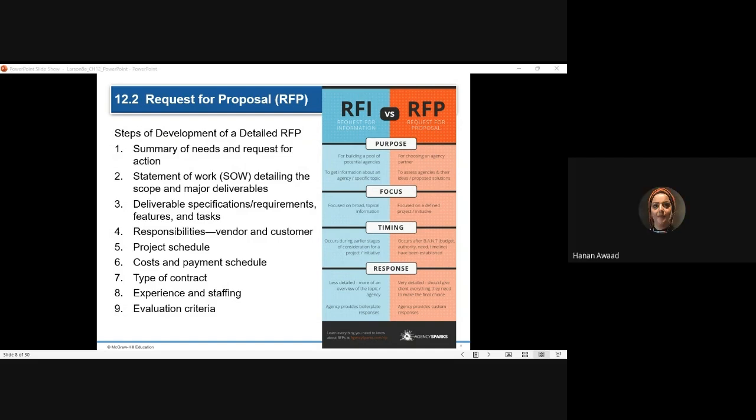So we have, for example, request for quotation or for quote, request for proposal, and request for information. Okay. Request for quotation, that's normally when we are asking to get the price and the payment terms, the conditions of the sales, if we wish to purchase something, mainly a material. Request for quotation contains the prices, the payment terms, the delivery time, all of the conditions.